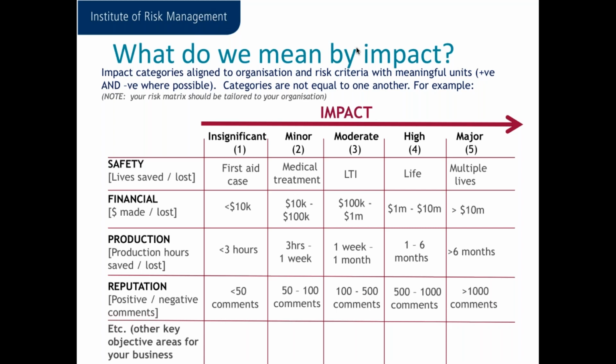And you can use historical data to help you build up these scales, to think about the problems that other organisations have had or you've had before, something that's caused a lot of pain for the organisation, and what you can actually cope with. But you could also use some of your key performance indicators. They're there to measure your performance against your objectives, so you could use the main one against a particular objective to help you fill in your rating scales here for impact.